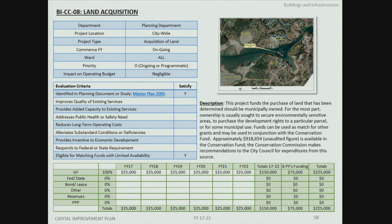The municipal land acquisition project sets aside a consistent amount of funds each year to accumulate and respond to opportunities to purchase land deemed appropriate for municipal ownership — either through the Conservation Commission, the Planning Board, or other opportunities. These funds are typically matched against grants or other external funds that become available.